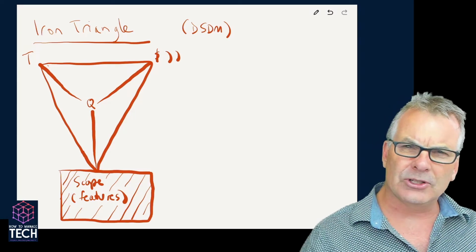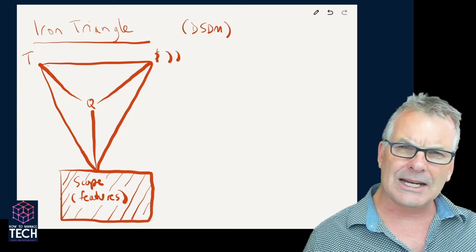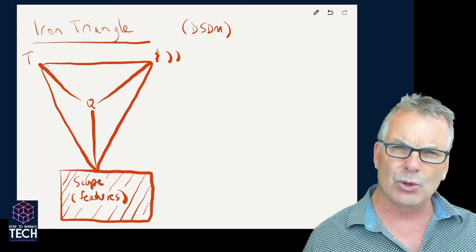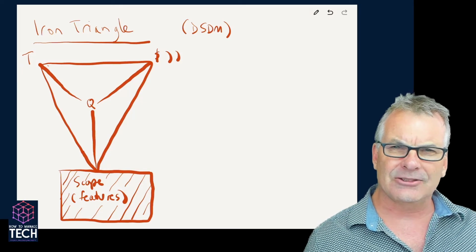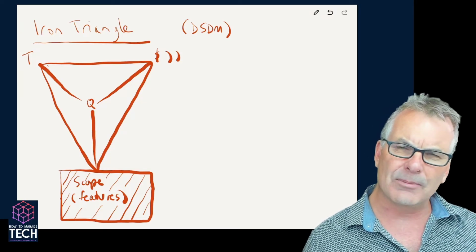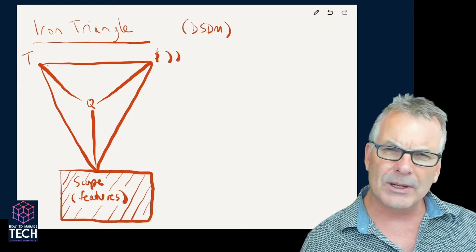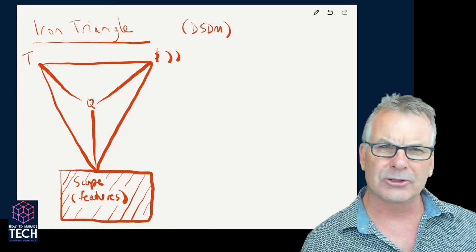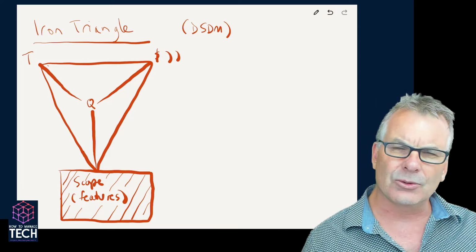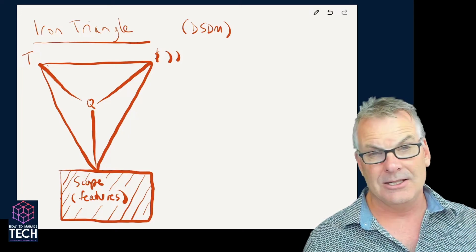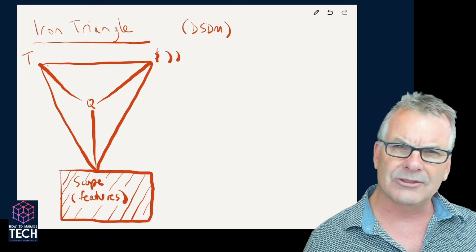Then, because we're locked into this 100%, we end up starting to run late. We might push back the deadline and the delivery until we hit this brick wall, at which point we can't go any later. So now we start to ask for more money. We're over budget, and we've spent 2.5%, 5%, 7.5%, 10%, 15% more money than was originally allocated, possibly even more, possibly tripled, gone completely out the door. Then we start to deliver substandard deliverables, buggy, defective work, and so the quality is allowed to drop.